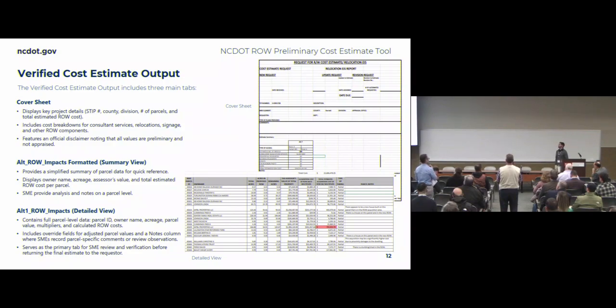Yep, so the first question is how can you submit just your right-of-way versus your right-of-way and your easements? It should come that way from your design file when you generate the shapefile, and it should be labeled differently in the shapefile when it's submitted. And then based on those labelings in the shapefile when it's submitted from the design file, we should be able to detail it out here.